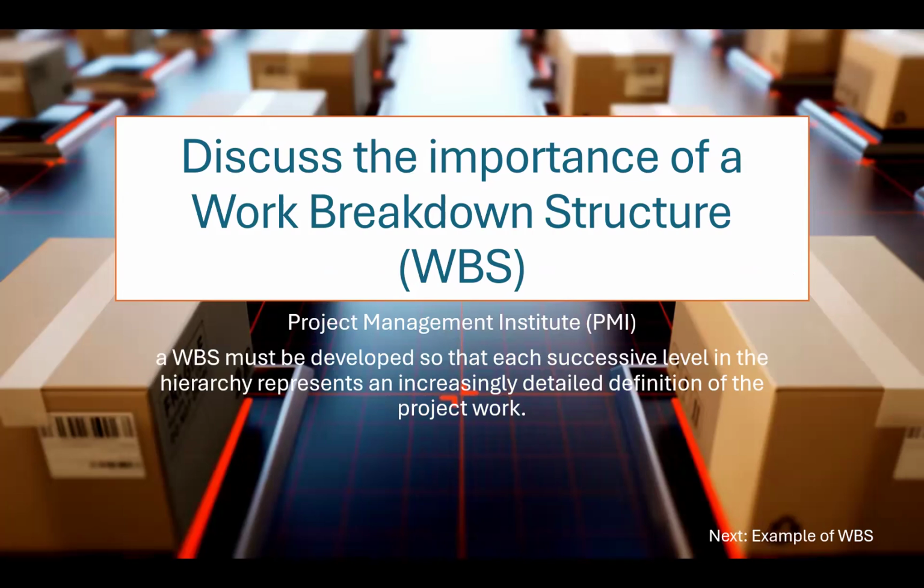So they recommend that we do a work breakdown structure, or a WBS. It must be developed so that each successive level in the hierarchy represents an increasingly detailed definition of the project. Recall in that last video, the organization structure. Project starts at the top, break the project down to parts, break those parts into other parts. So it's just like an organization chart.